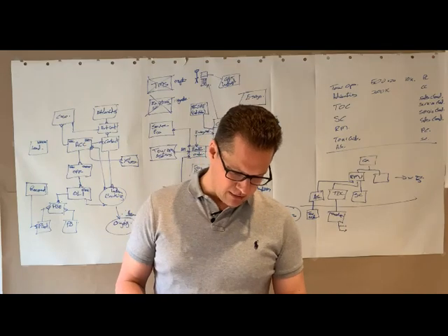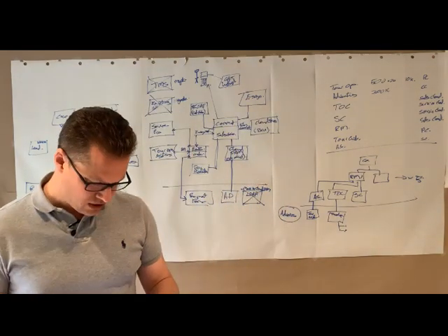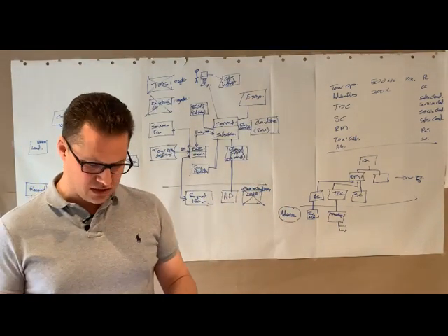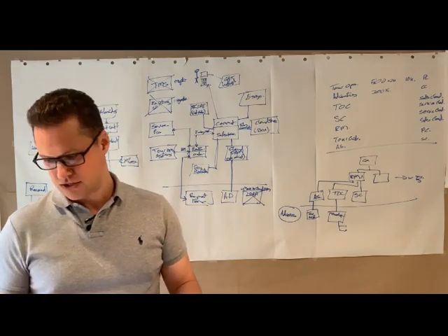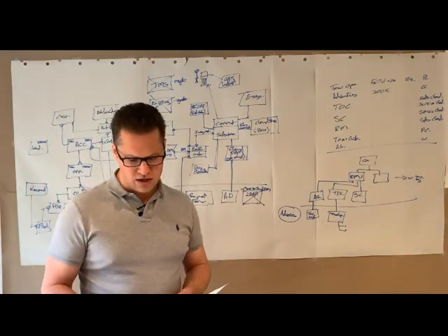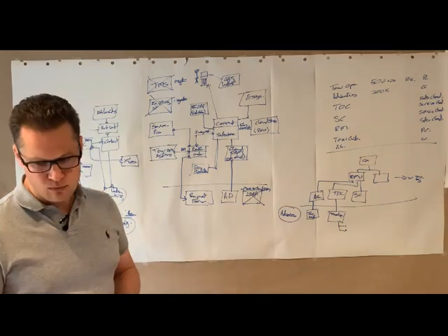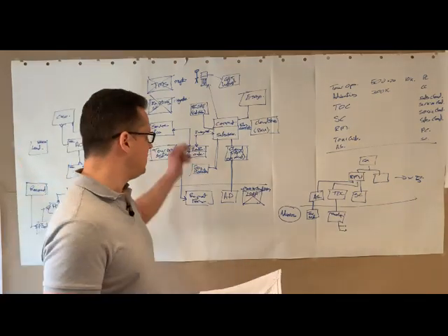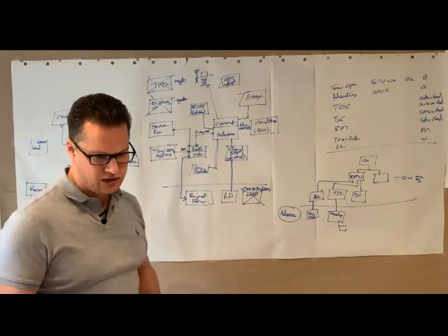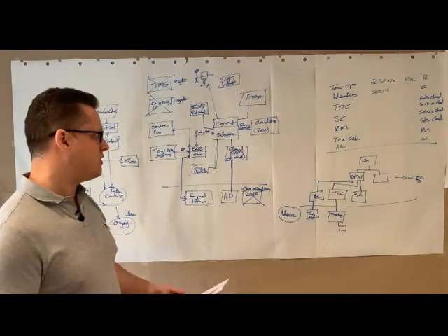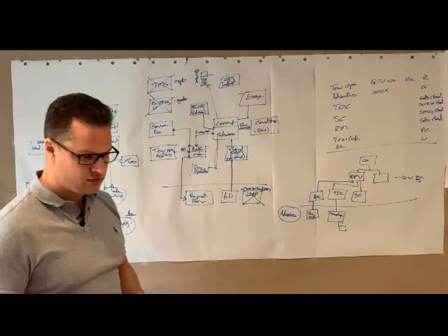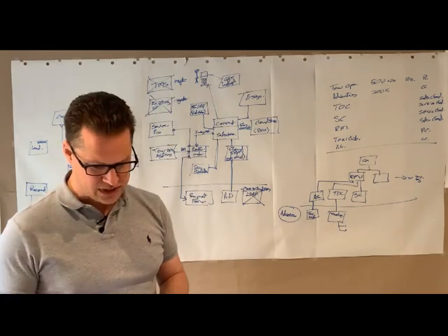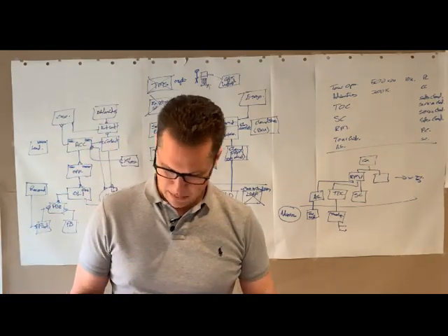There's also a time dependency on the migration. So during cutover, it's expected that it may take up to a week to run this process. In order to prevent downtime, what we'll do is we'll do an initial load into Salesforce a week before, and then at the point of cutover, we'll look to load the delta from the TMS into Salesforce.